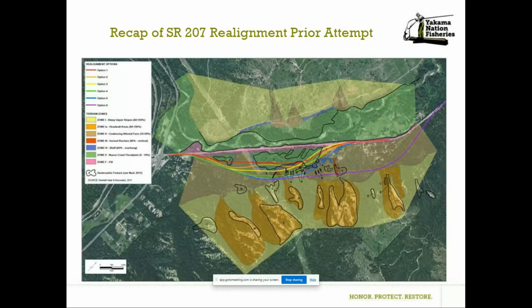And I think that alternative 1 was estimated in that alternatives analysis at 16.8 million. And the 55-mile-per-hour alternative that's being proposed here is, I think you had mentioned, close to 11 million. So it's another 5 million, and it might even be more than that.